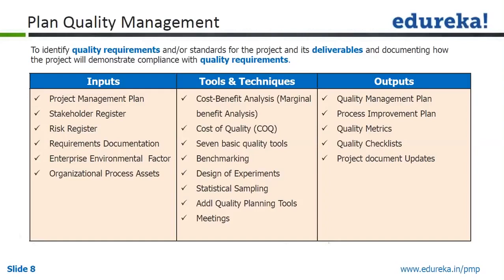For example, for schedule variance, I can say plus or minus 10% of schedule variance is allowed. So you know the project can be behind or ahead of schedule by 10% of whatever duration you have for the project. Those are the kinds of quality metrics we use, usually with control limits.